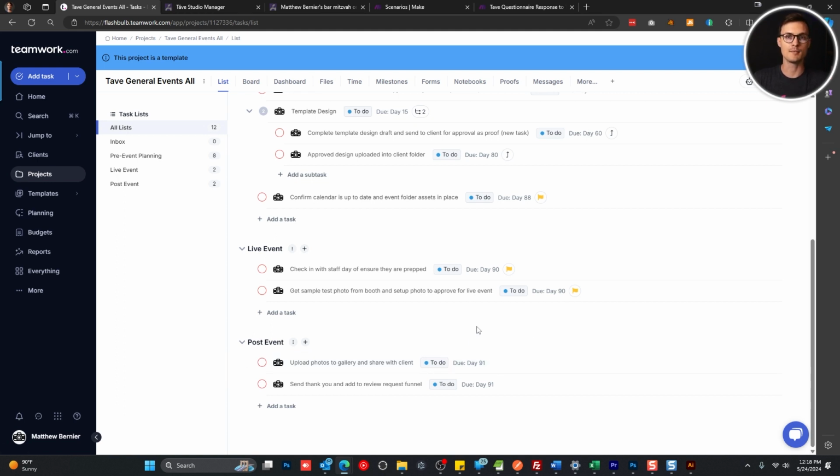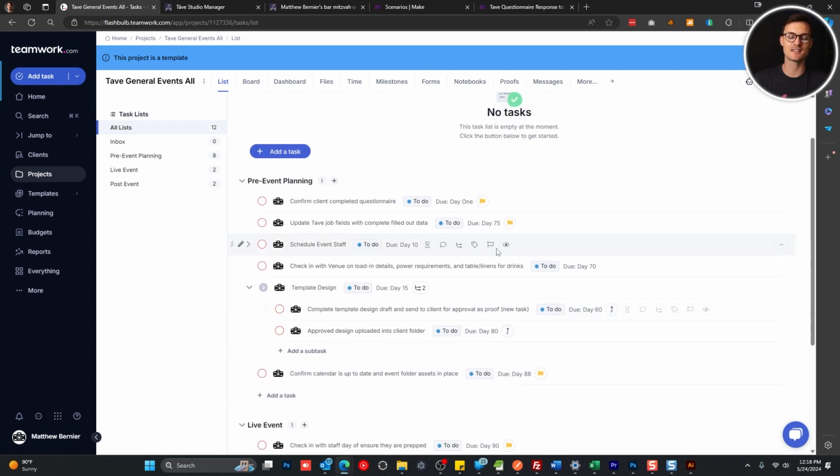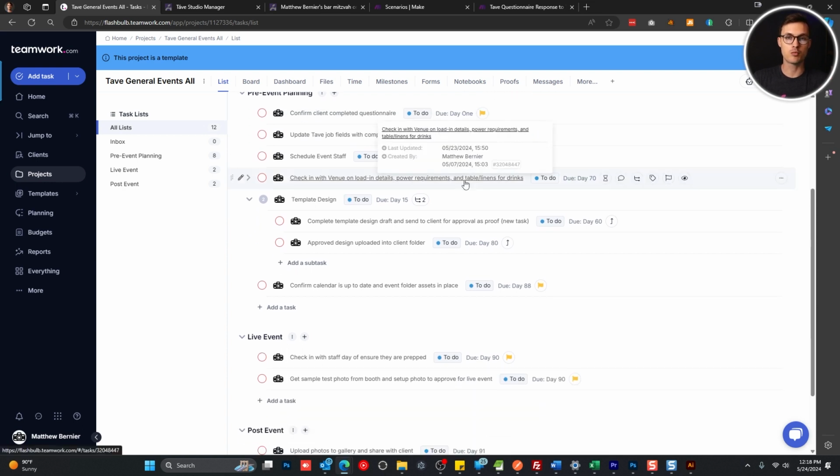Now, if you want a longer timeline, let's say you want it to be over the course of 4, 5, or 6 months, then you'll basically need to start at the end with your 6-month timeline and then work your way backwards to see when a given task that you've created would eventually become due within that timeline. So that's going to allow you to automate the project based on the job end date and give you a series of due dates accordingly.